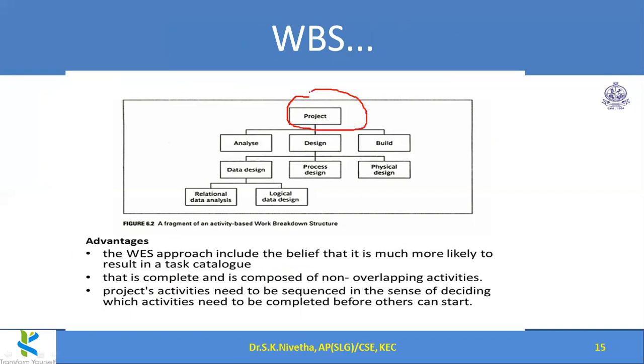This is the overall project, and the analyzing part, design part, and build part. So they are deriving the analyzing activity, design activity, build activity. And the analyze activity is not split into further modules, because it has a clear start and clear end, forecastable, everything. It is not divided further. And the build part is also not divided further. It has a clear start and end, forecastable, everything matches.